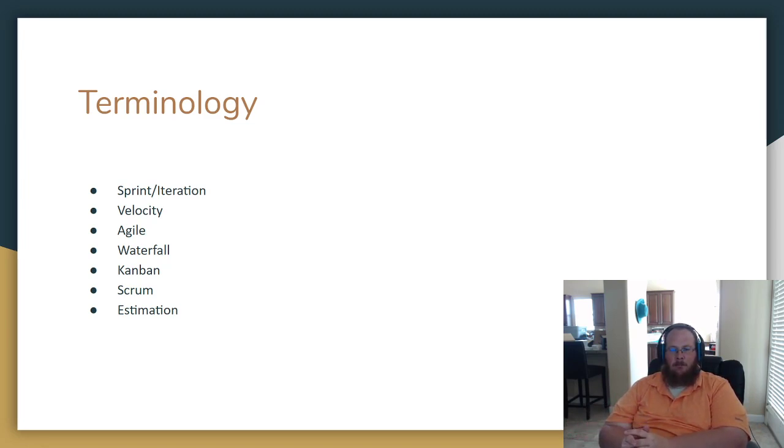And let's say it takes 3 weeks for the first 8 things. So you say, okay, 3 weeks is a good amount of time for us to work together, plan everything out, and get it executed. So we're going to work in 3-week increments until the house is built. And that's essentially what a sprint or an iteration is. It's a defined time box for work of a given project. The project is building the house. And you might go through 18 sprints. You might go through 2 sprints, depending on size and quality of the house. But that's what a sprint or an iteration is, just a time box of work.